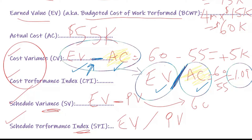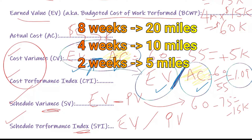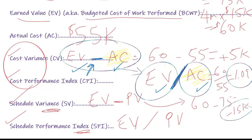For schedule variance: earned value minus planned value. Our earned value is $60,000 and our planned value was $75,000, so we're behind by $15,000. That $15,000 is the equivalent of the one mile we're behind — we should have done five miles in two weeks but only did four miles.